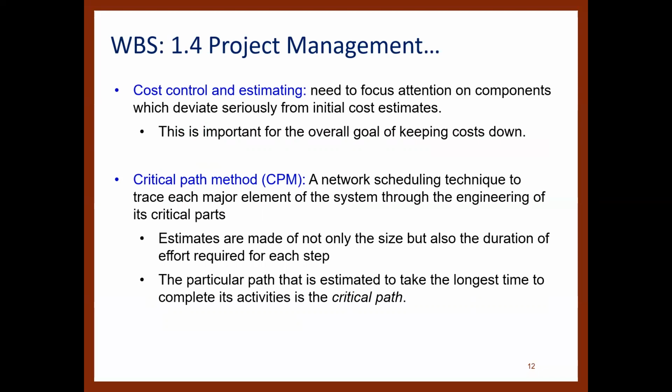And another tool that is very useful is the critical path method, which is a network scheduling technique to trace each major element of the system through the engineering of its critical path parts. In this, estimates are made of not only the size, but also the duration of effort required for each step. The particular path that is estimated to take the longest time to complete its activities is what we call the critical path.